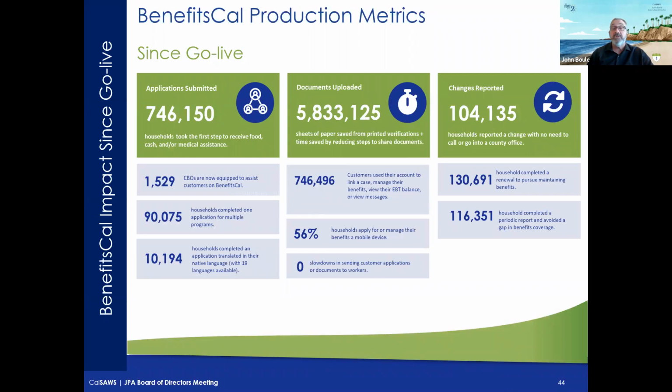It triggers the holdback payment to be released. So after this presentation, we'll come back in August and do a summary of that, and assuming there aren't any big concerns, I will be signing off on that final acceptance. But we wanted to walk through that to see if there were any concerns on these items based on the criteria in the contract. Thanks, Rachel.